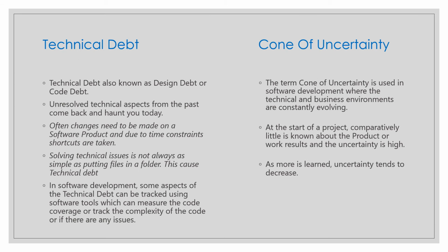but they are adapted by the definition of done, and they are also a part of the product backlog. While functional requirements are a part of the product backlog, non-functional requirements are also added by the product owner, as a part of the product backlog and the product increment. The most common approach is to describe the non-functional requirements in the definition of done. So your definition of done contains both.